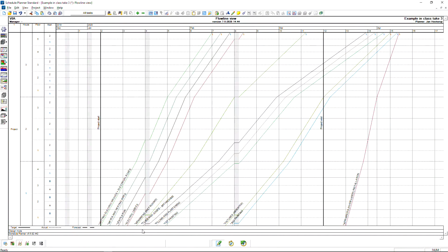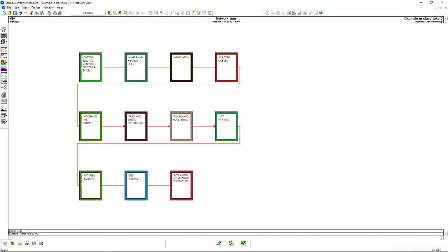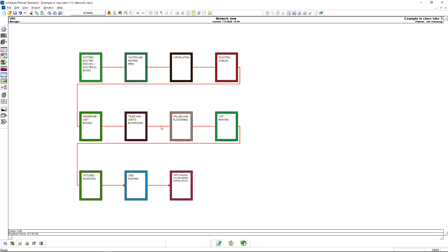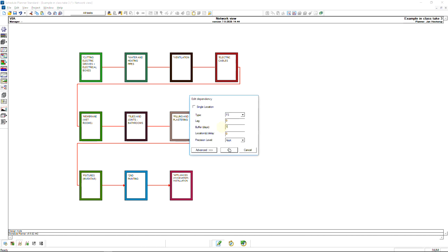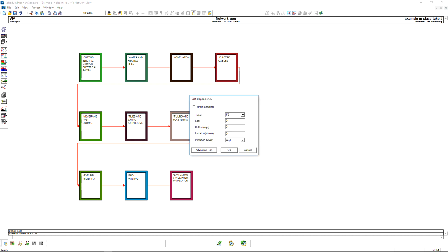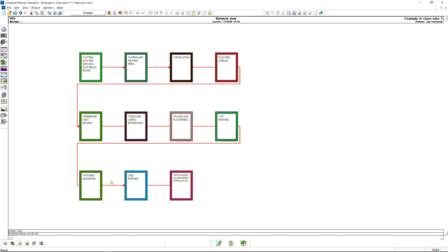We have the start of the next activities immediately after. Maybe you disagree that you want it, but I prefer to have a 1 day buffer. Of course, it costs in the overall planning, so it's not necessarily something that you can afford.